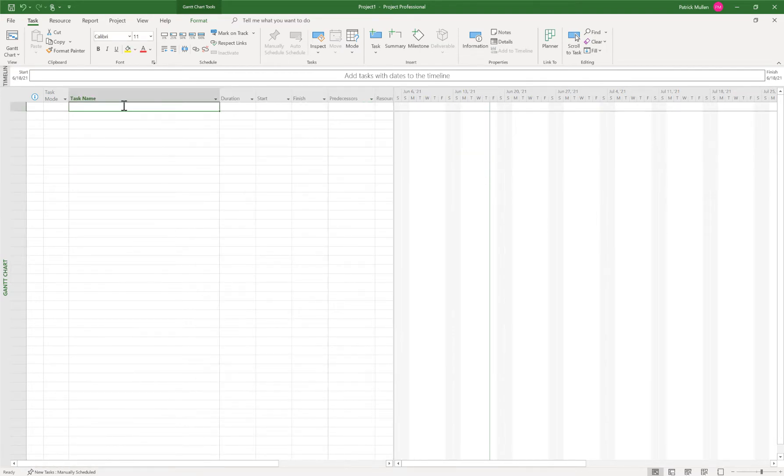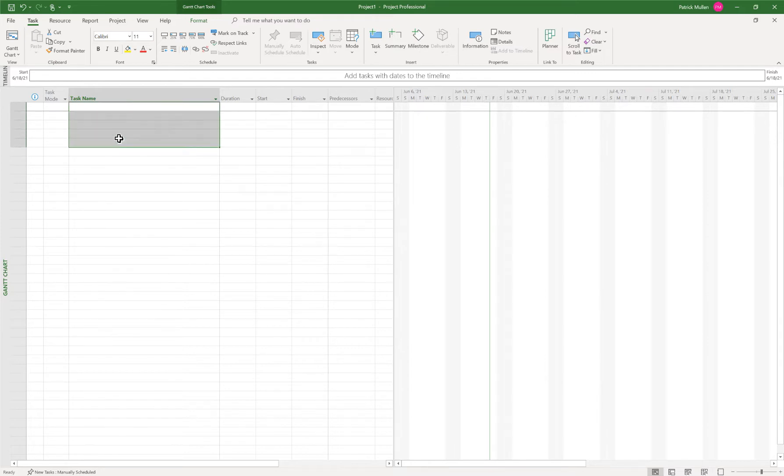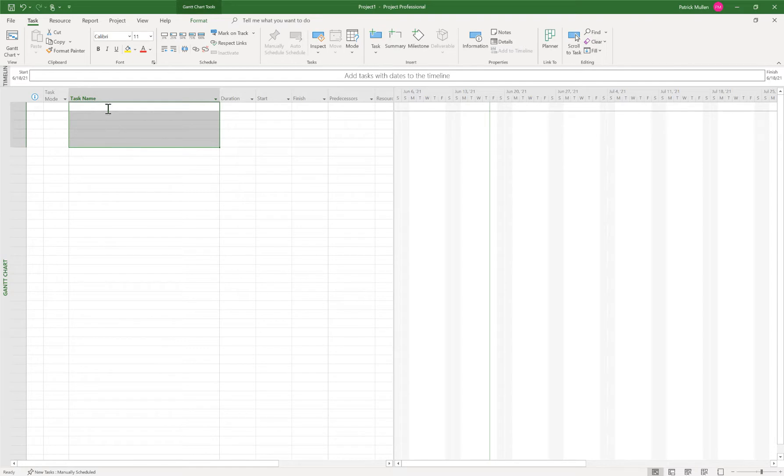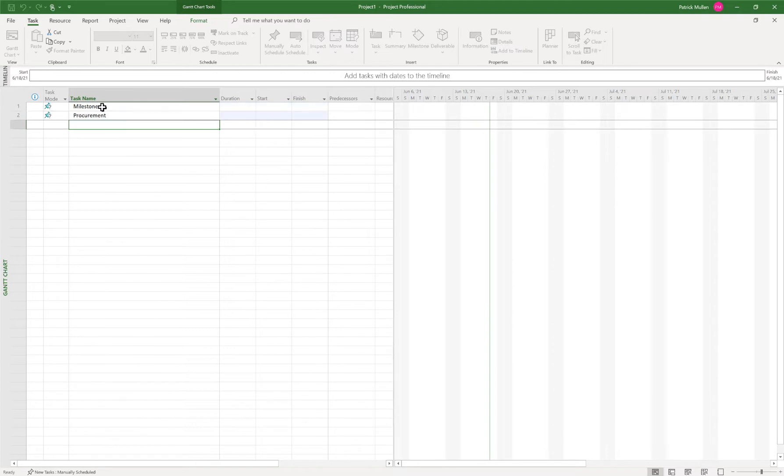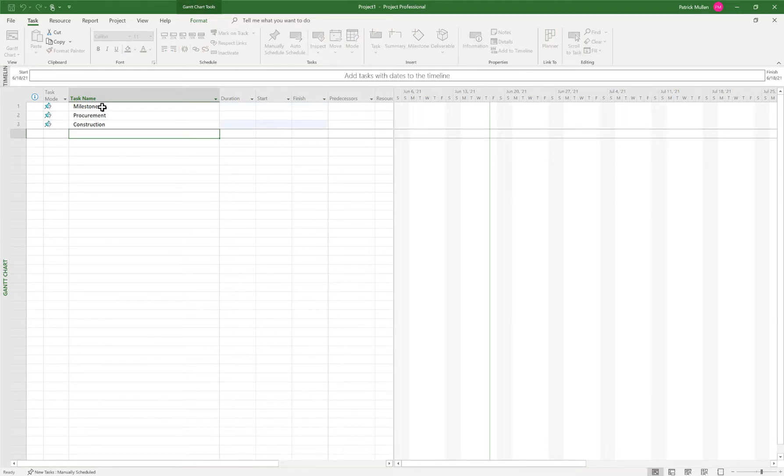So I'm gonna start by creating the summaries. I guess I call them the work breakdown structures, the buckets that we're gonna put our activities in. So I'm gonna call it Milestones, Procurement, Construction, and Closeout.